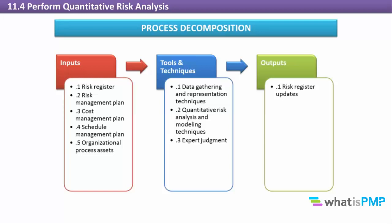The risk management plan establishes how quantitative analysis is to be carried out and who has what responsibilities for it, and the project schedule and budget indicate the time and money that can be spent on quantitative analysis activities.